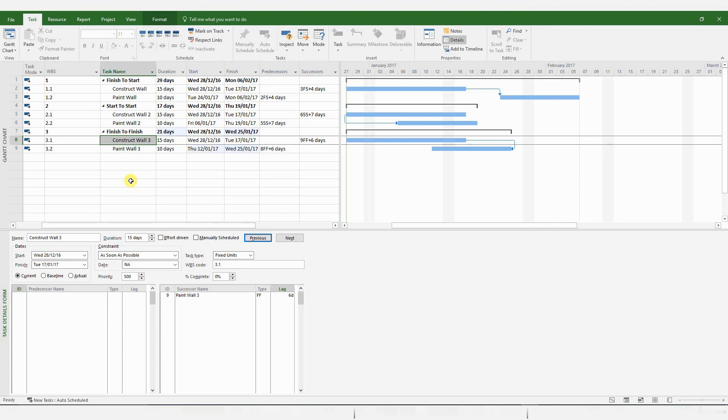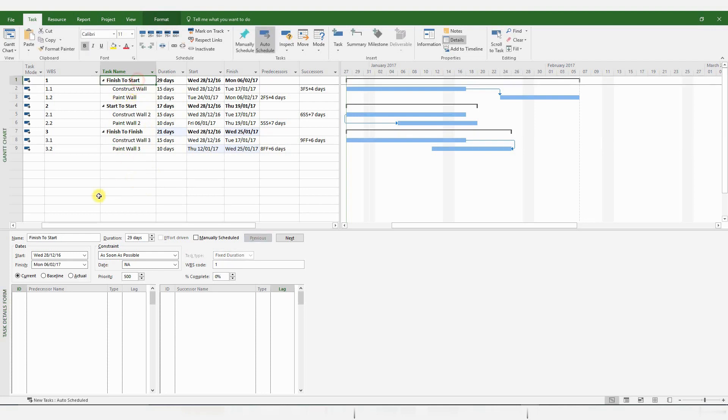So there you have it. So these are the logical links that you will be using mainly for creating programs in MS Project. Now, please do bear in mind that it is always good practice to use Finish to Start relationships wherever possible. And it's extremely useful for delay analysis. All you have to do is break down your activities into a little bit more detail, so you may have more activities. But if you can link them by using Finish to Start logical links, not only is it good for your project control in terms of planning and scheduling, it is also extremely useful for carrying out delay analysis.